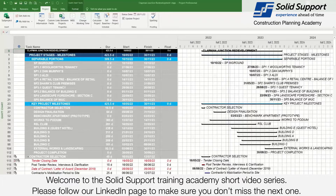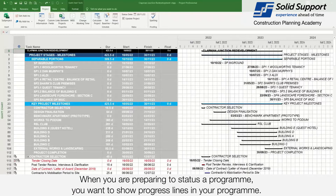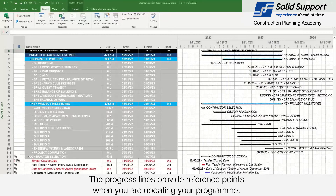Welcome to the Solid Support Training Academy short video series. Please follow our LinkedIn page to make sure you don't miss the next one. When you're preparing to status a program, you want to show progress lines in your program. The progress lines provide reference points when you're updating your program.